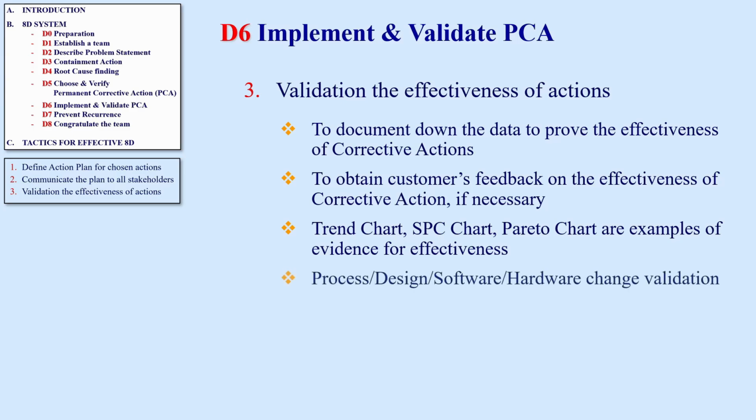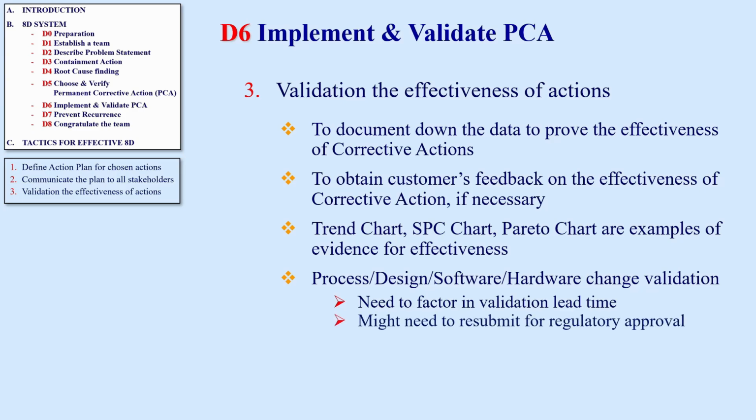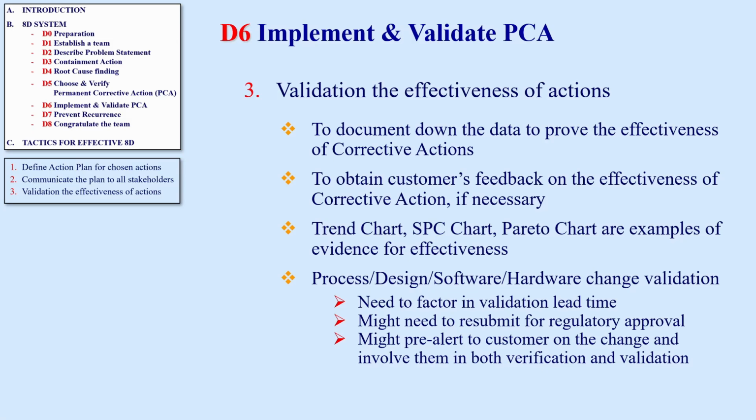When we need to do validation for a process, design, software, or hardware change, remember to factor in the lead time for validation. We might need to resubmit the product for regulatory approval. Also pre-alert the customer on the change, and involve them in both verification and validation.